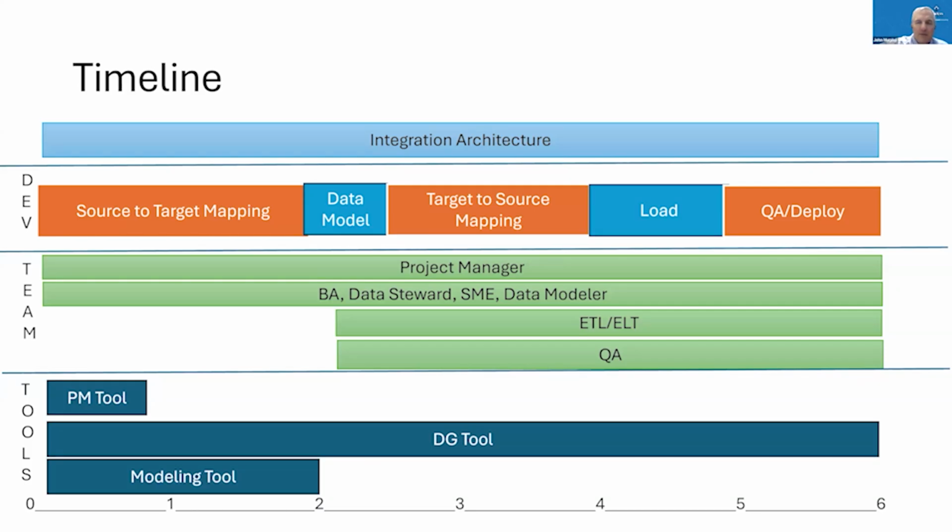And if I was to do this right, the loading, the definition of the ETL and the like, this is the ETL. We'll start halfway through the target to source mapping. We'll interact with the ETL designers, the ETL coders, the ETL architects to understand what they need from a data standpoint, from the technical standpoint, to be able to do this, and introduce them into the structures that we're creating, so that we know what our data model looks like. And here's what that means from an ETL standpoint. There's overlap in the target to source mapping and the loading.